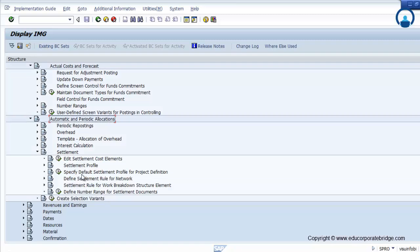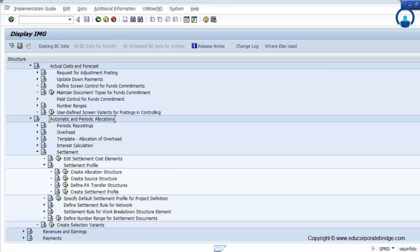Now we are talking about settlement. Settlement is one of the crucial activities in the project system module, because the WBS, network, or project is a temporary cost collector. You need to settle that cost across a particular object. In the case of a customer project, you settle the cost on a GL or a cost center. In the case of a capital project, you need to settle the cost through AUC to a fixed asset. There are different cost objects available in the system.